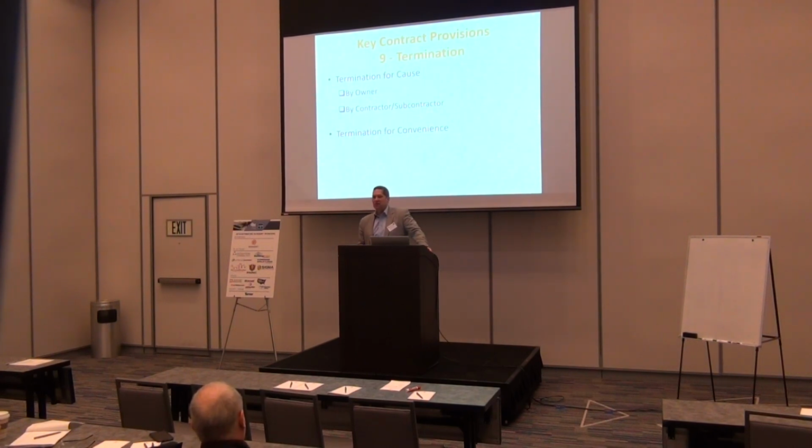I will just tell you, because I've dealt with a lot of termination cases, they're very hard to win if you're the person terminating, whether it's a general contractor terminating a subcontractor or an owner terminating a contractor. Generally, the way the courts are going to look at it is if somebody's costing you money, then you withhold the money, you supplement, you sue them for the dollars.